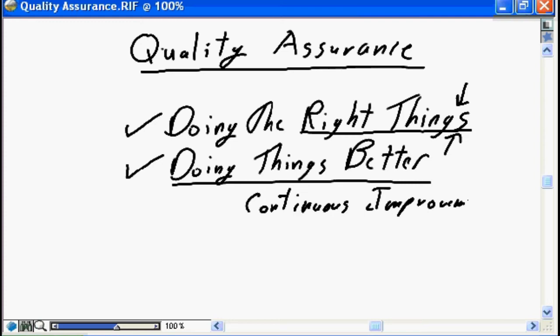Making sure that the quality process is truly value added, that the quality processes defined in your project will ensure that the final product meets requirements and is fit for use. It's all about doing the audit. There is an element of policing, and I know that's a nasty word in most people's vocabulary, but there is an element of policing in the quality assurance process. We do the audit, and we ensure that the steps defined are being followed. Again, I know I repeat myself, we defined that walkthroughs are to happen, and we defined that walkthroughs need to have 6 people. The audit reviews that, ensures that is taking place, and then with our continuous improvement process, we make improvements by reducing the number of participants down to 4, or whatever the appropriate number will be.